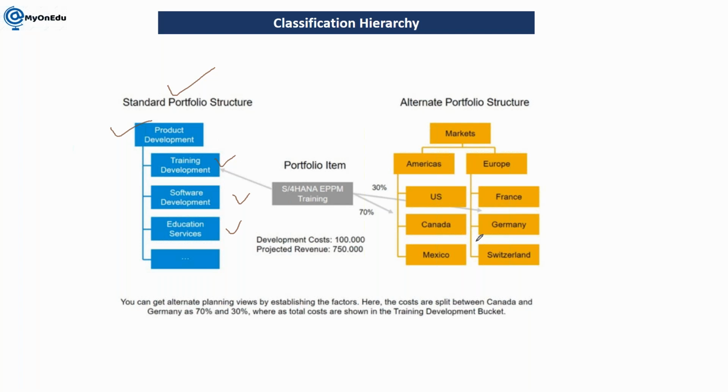Or specifically, if you want to see how many projects you are doing in, let's say, implementation within IT infrastructure, you need to have some additional hierarchy in the system. We are calling it a classification hierarchy. This is optional. If you don't need it, you don't need to create it. But if you create it, you will definitely get your data in different dimensions.